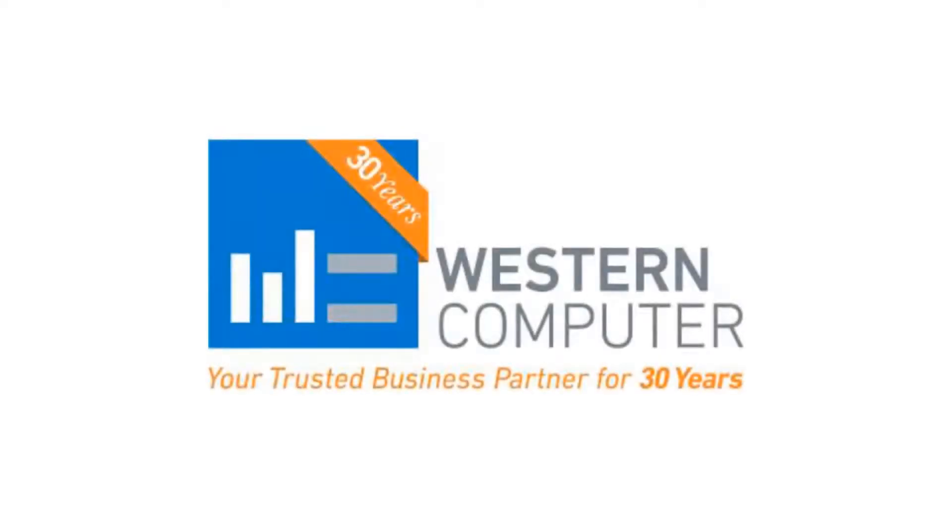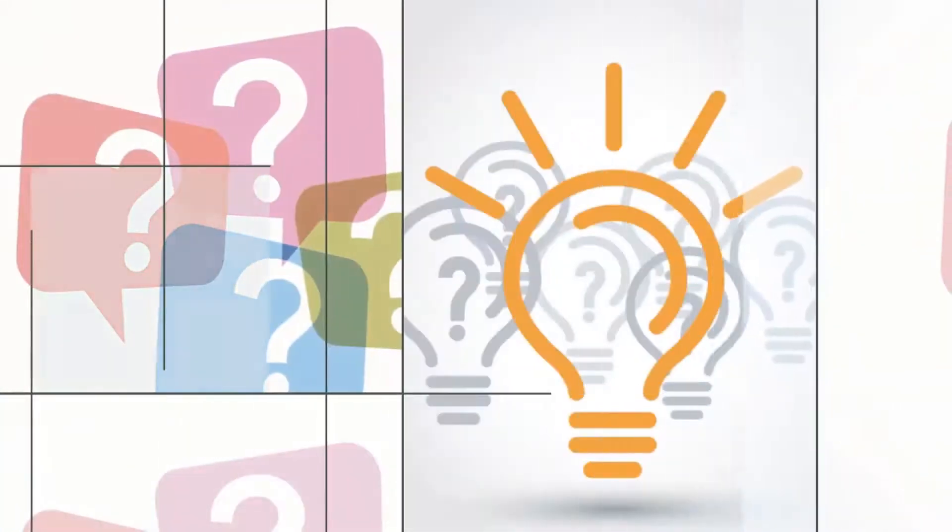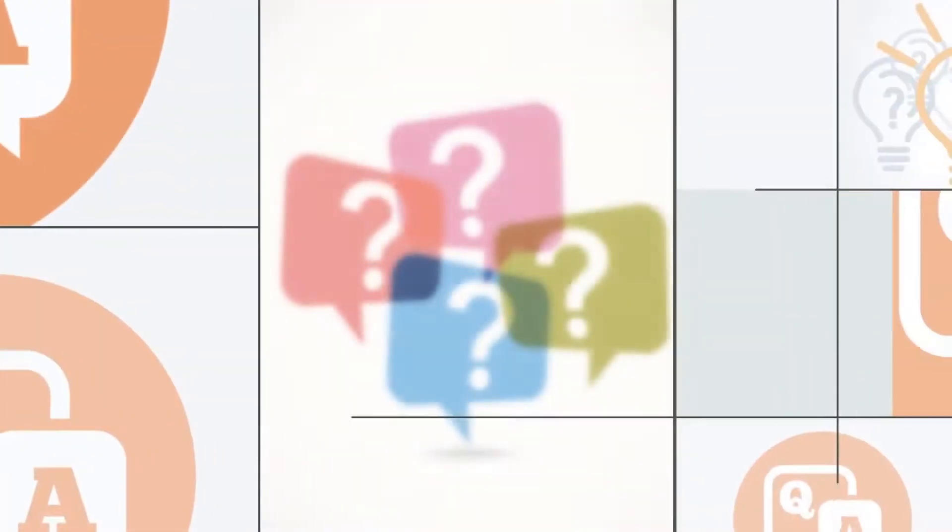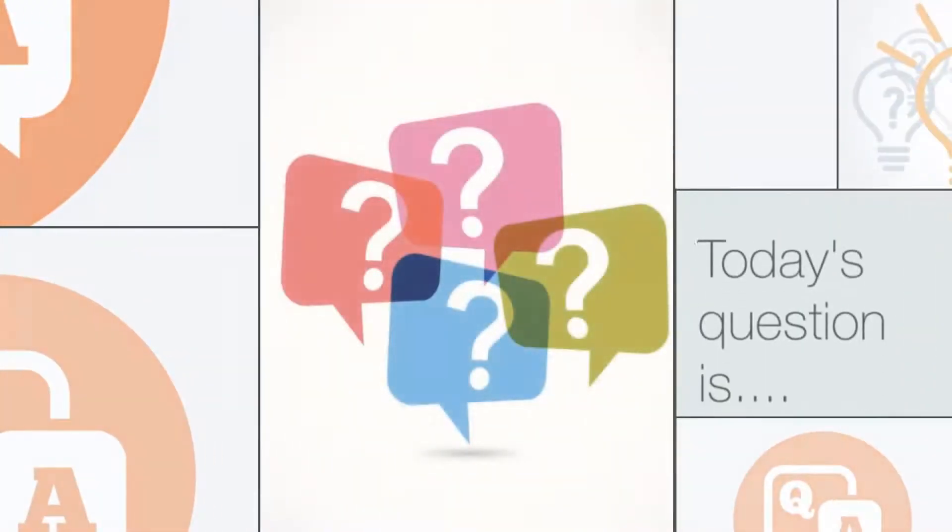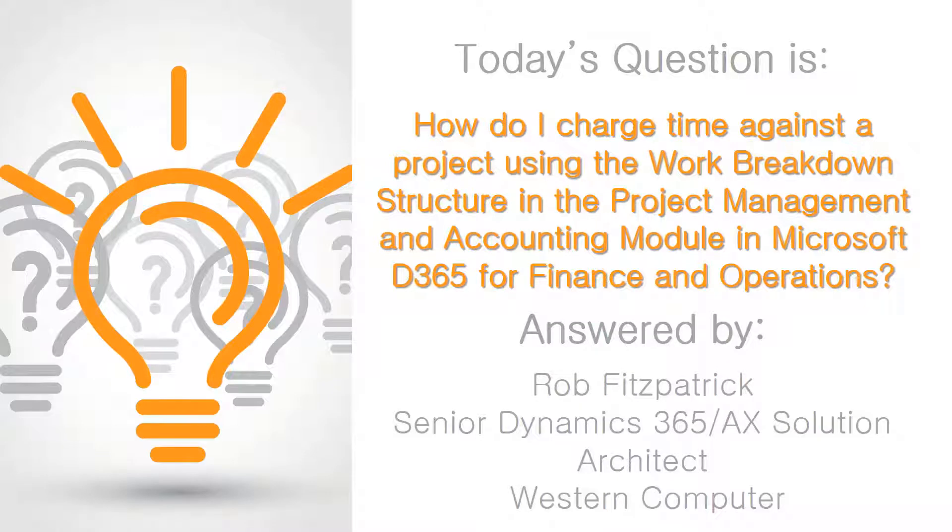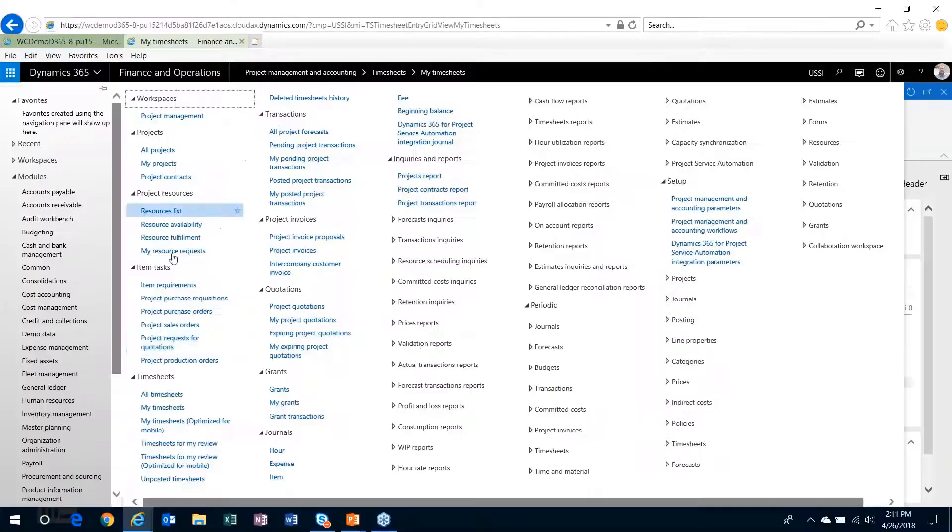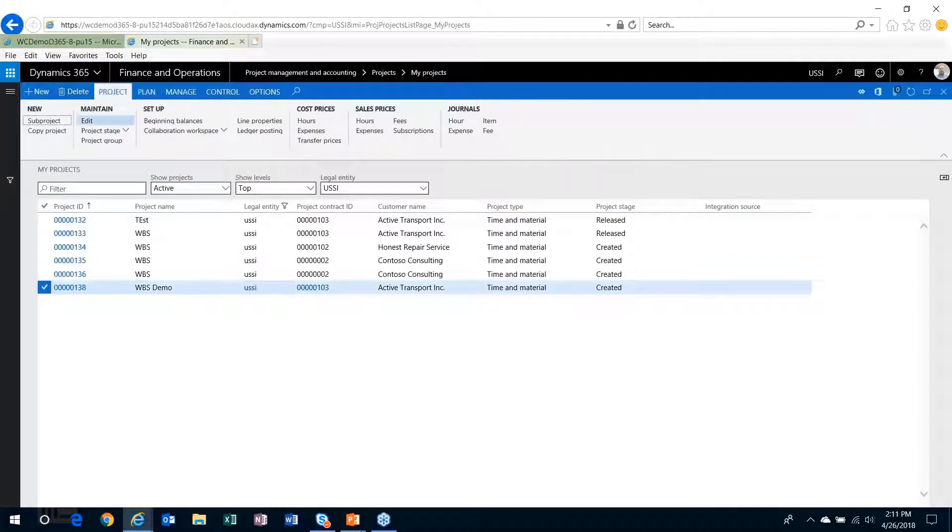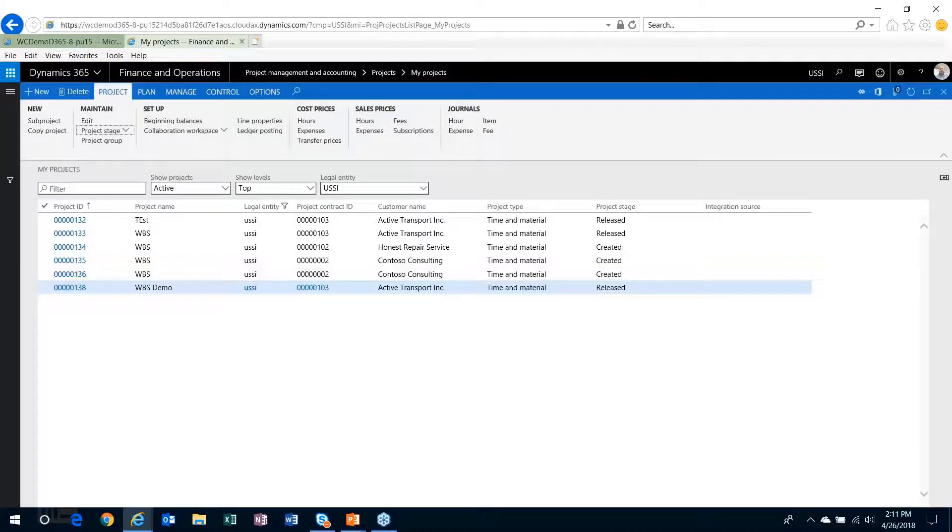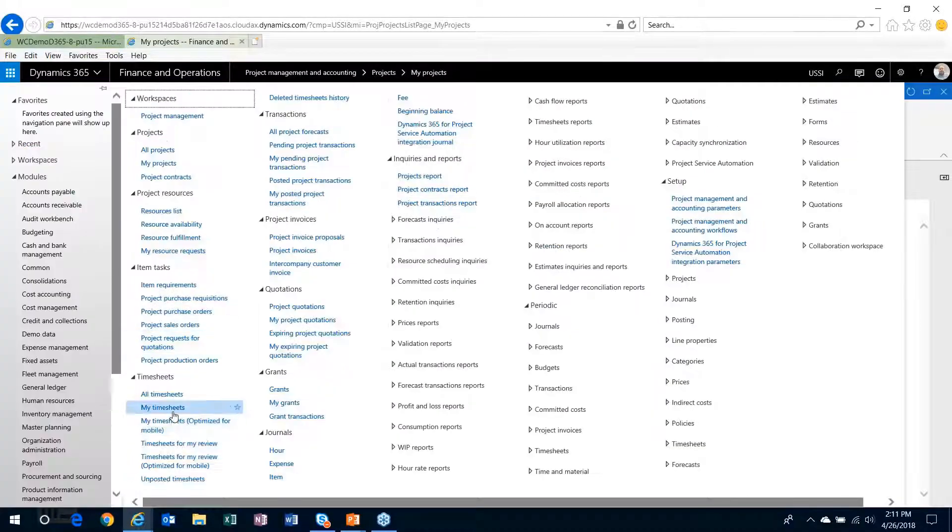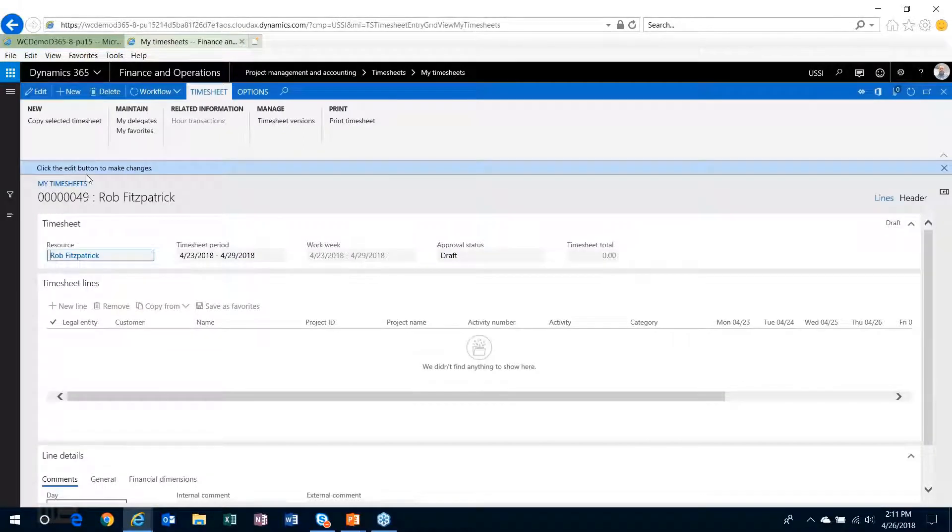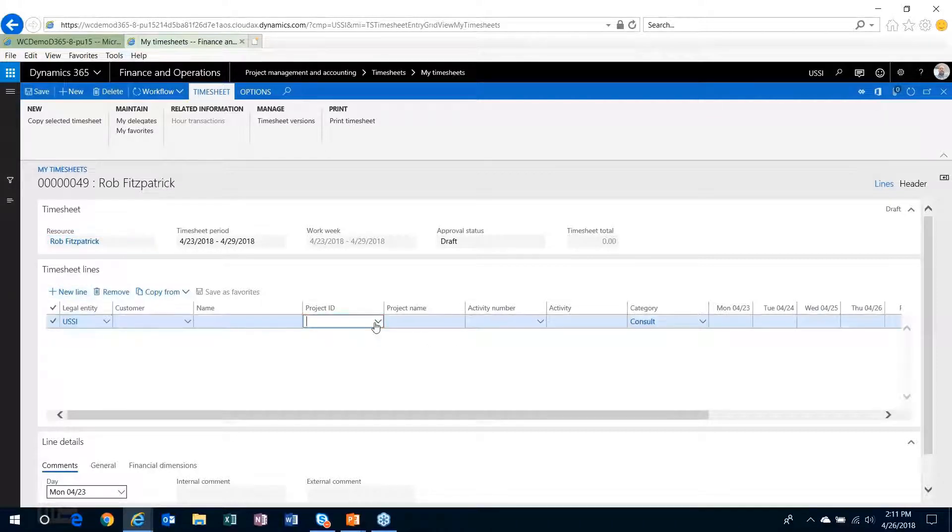Of course I always forget to do this last part, which is make sure that my project is in process before I charge time to it. Okay, so here's my timesheet. I'll edit my timesheet and I will choose